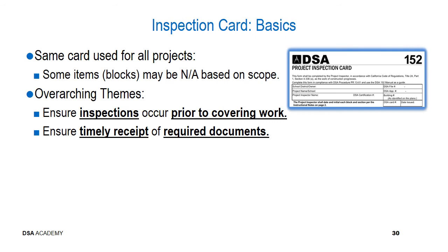The overarching themes are well explained and summarized here. It's to help ensure that the necessary inspections occur prior to covering up the construction work, and it also ensures timely receipt of the required documentation associated with that construction work.